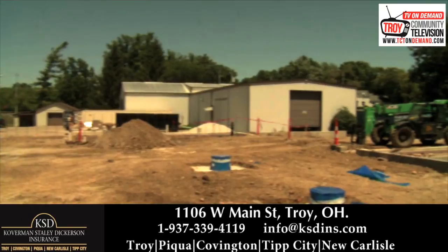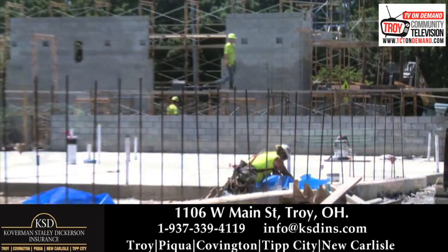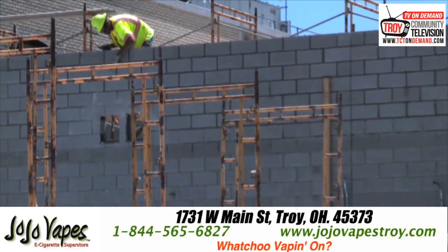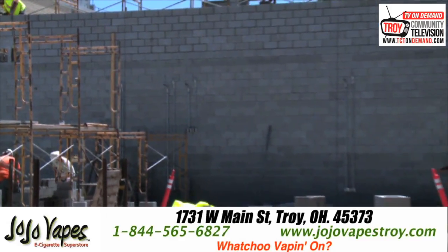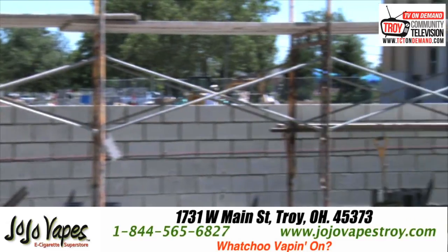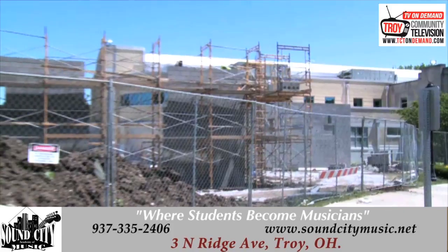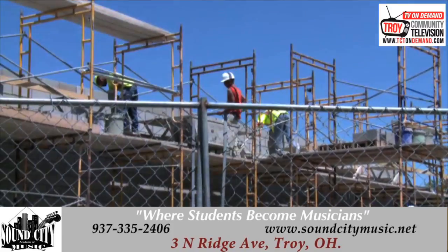As you can see behind us here, this being the north addition, the largest addition of the four that they'll be making, there's a lot of folks working on the walls of what will be the multi-purpose room that'll be available for rentals. So they're really focused on that right now. They've made some significant progress in the last couple days, and yesterday morning they poured all of the concrete floors for the western half of the northern addition.